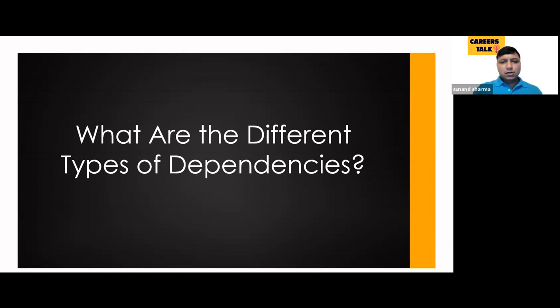Now we have something called technical dependencies. Technical dependencies occur when the work requires technical changes in a very specific area of that particular system, and that is in the control of an outside team. So for example, you need a change in an API that is managed by another team. Now this can be compounded by tight coupling. For example, if your API is not strictly versioned, your requested change might require changes to the downstream system as well, which means even more dependencies for you. So these are certain kinds of dependencies.